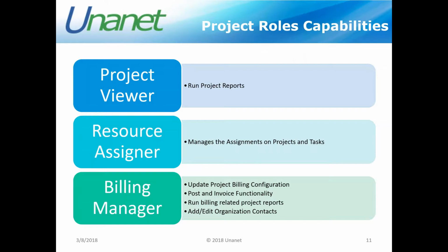Now, the billing manager role is also something that is looked at from a project roles capability because at the project level, what the billing manager can do is update the project billing configuration. So if you are invoicing out of Unanet and you need to set up what's the invoice format that you want to utilize? What is the invoice numbering scheme that you want to utilize? What are all those different pieces that you want to bring in? Who's the contact that you're going to utilize for this project's invoicing? All of those things are available to the billing manager.